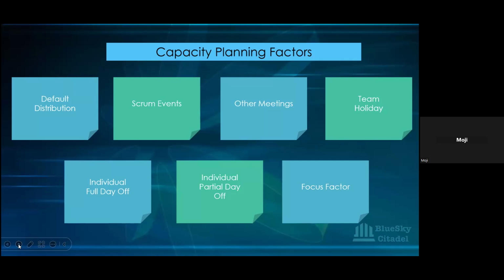And then you have Scrum events. The Scrum events are the hours you spend on your Scrum events: sprint planning, daily Scrum, sprint review, sprint retrospective, refinement and all that. Like I said, they are productive in their own sense, but they are not the times when a developer sits down to code, or a tester sits to carry out the quality tests they need to carry out. So you need to remove all that in order to get the productive hours they are going to use to work.